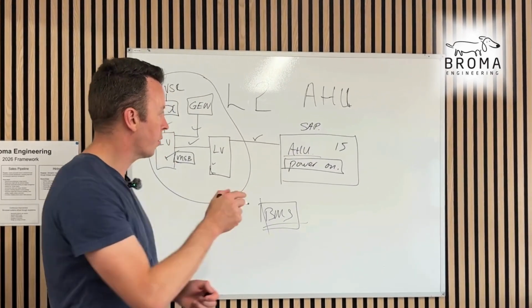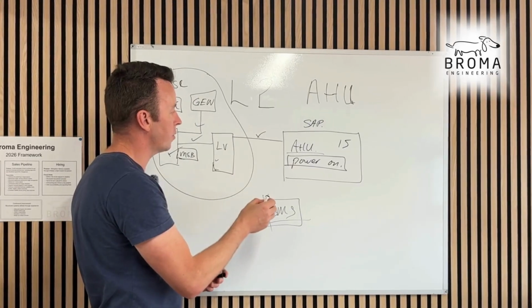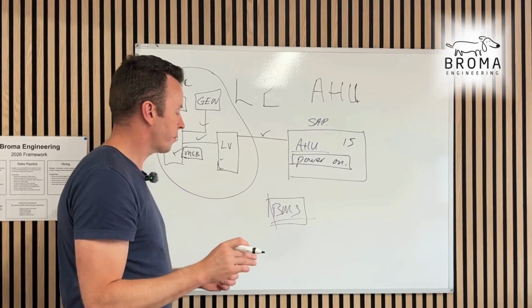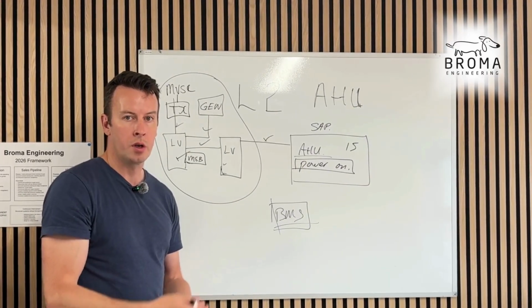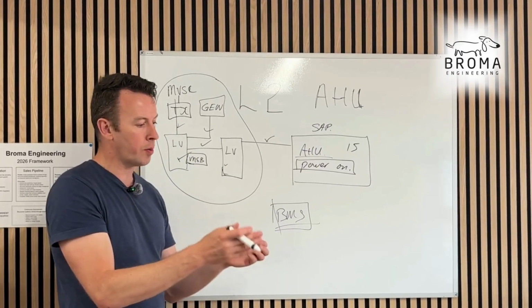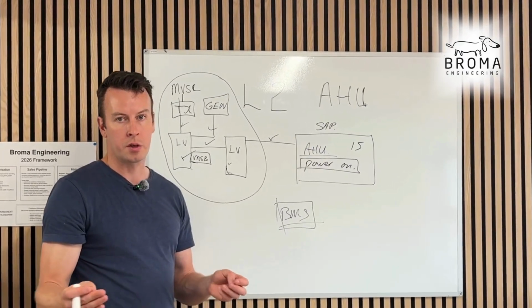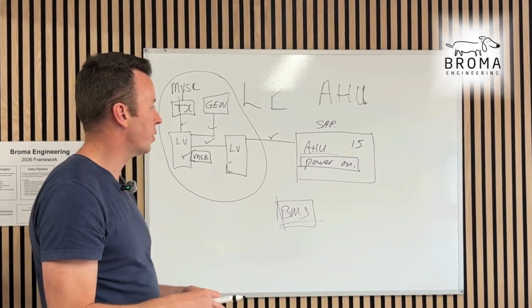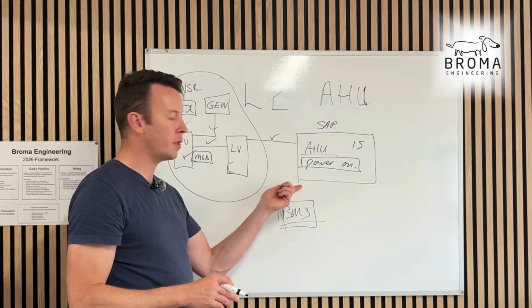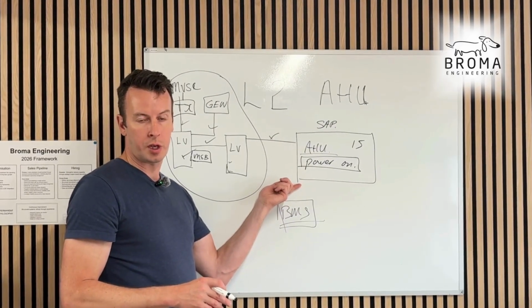And what's in our hand is that we can organize everyone to be here, do a pre-energization meeting, make sure in our commissioning plans that these are the documents that we're presenting for level 2. They're all on the CDE, they're all labeled properly, they're all nice and ready for inspection by the CXA. We're encouraging the CXA to do pre-inspections. We're talking about this for days in meetings before this happens.